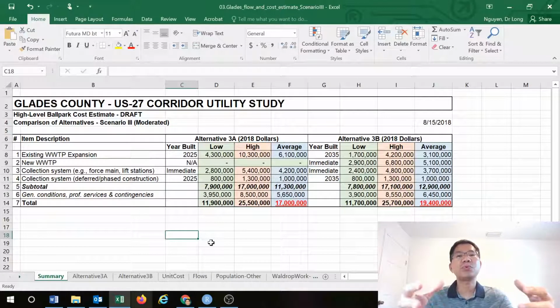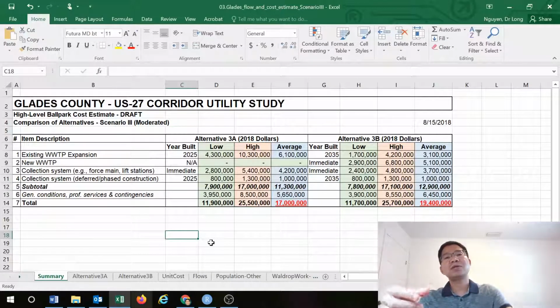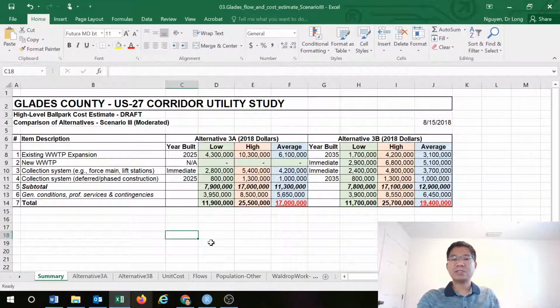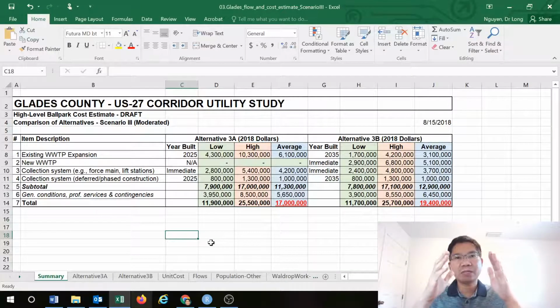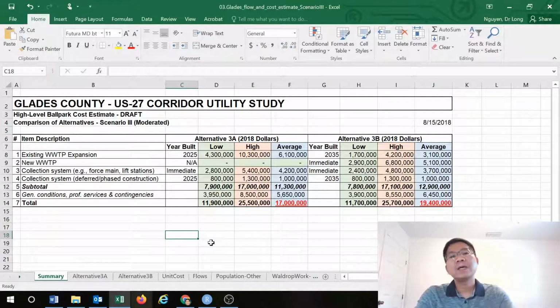And now I'm going to show you how that works and how it relates to the work we did, applying the concepts we learned in today's class, lesson 3, about the index and the cost capacity factor, and how to consider that in estimating a project when we have minimal information from the engineering standpoint. We don't have a detailed design yet because at the beginning, when we receive the need, there is no engineering. But we need to estimate for the owner to find out where the money should go. This case study shows you that whole process.